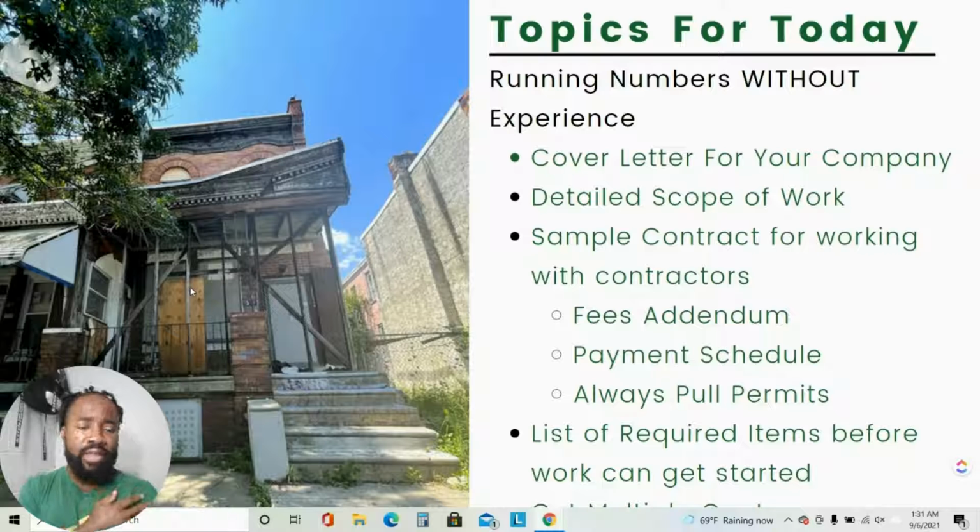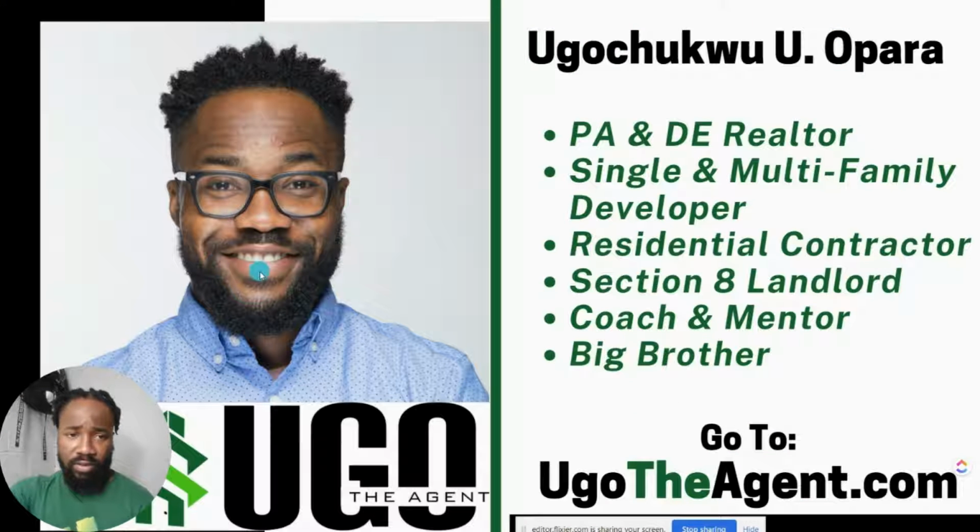You start to break things down, and it doesn't even matter if you catch everything. Just take your time and just write everything down that you can. And then once it's all written down, go back outside the house, and then as you walk in, read everything and see what you've missed, and make alterations, make adjustments. Get all your spellings taken care of, all your spell checks taken care of. Like, do all of this good stuff.